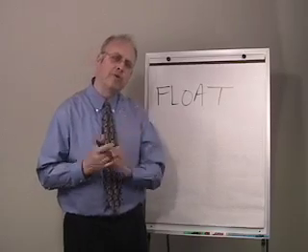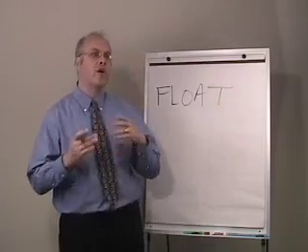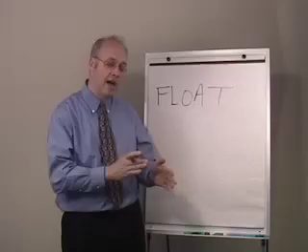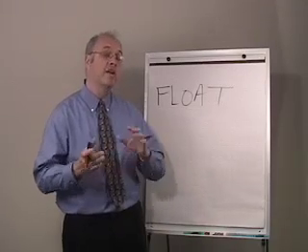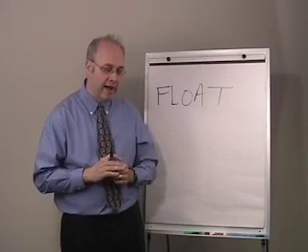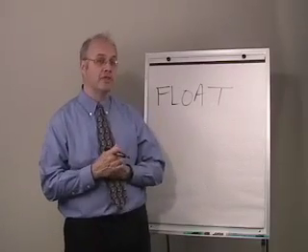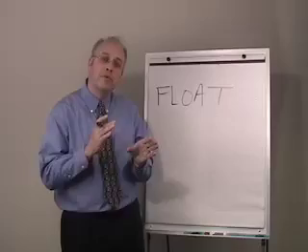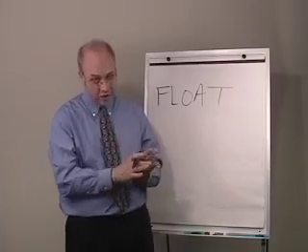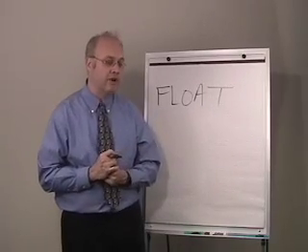And then the other two provisions are relatively rare, although I think it's fairly common in a subcontract for the subcontractor to have an obligation to start work on the early dates and finish on the early dates. So I think it's relatively common in subcontractor contracts for float to belong to the general contractor.